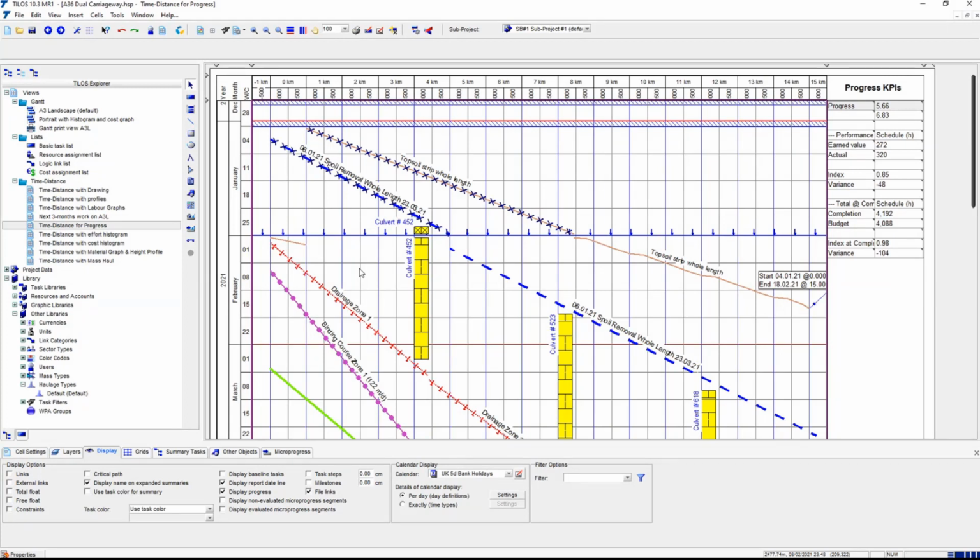So you've got to think about those complexities if you're going to progress it in that way, which is generally what people do. So pipelines, the crew boss every day says what they've done. There's a little feature called micro progress. You can track exactly what was done every day, and you know, this becomes the driving sequence.